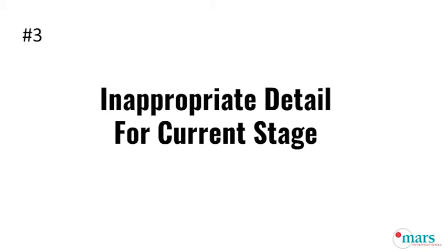A spec that is 80% there now is way better than a spec that's 100% there, but you've waited another 2 months before starting anything on your project because you didn't want to do anything until your spec was completely nailed down. Because I guarantee, first of all, it's hard to really understand what you don't know until you get into it. But also, it's going to change, right? Things you spec'd out that you thought you wanted, it's going to turn out you didn't want, or things are going to be really driving your cost and making your product much more complicated to get certain features and things like that. You can't be paralyzed by having everything in at the same time.